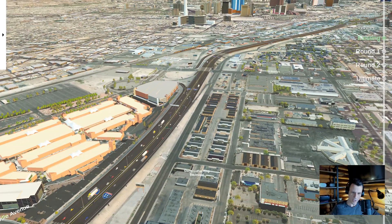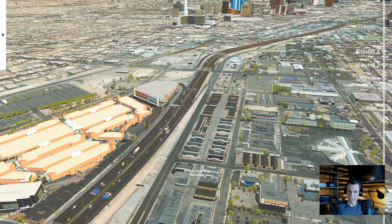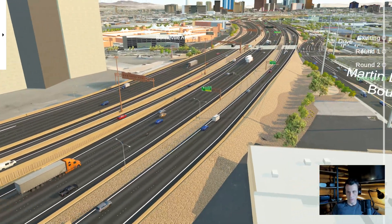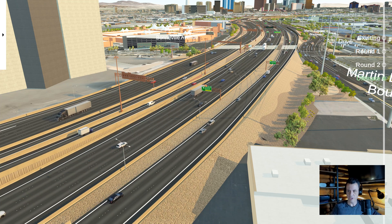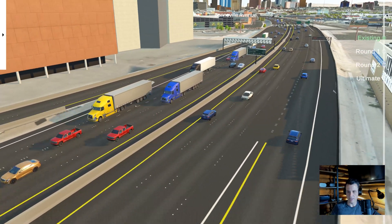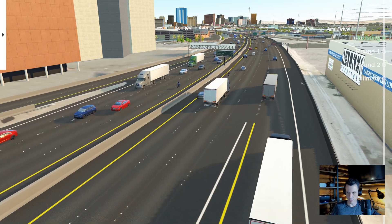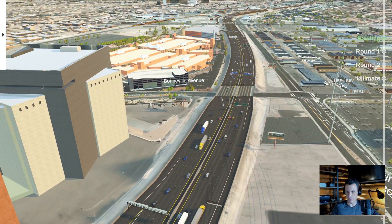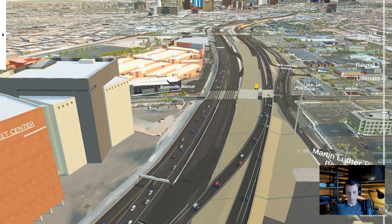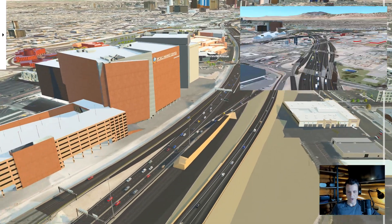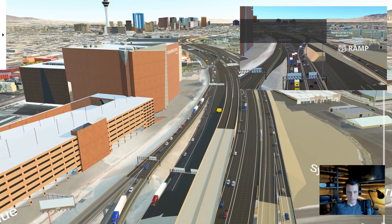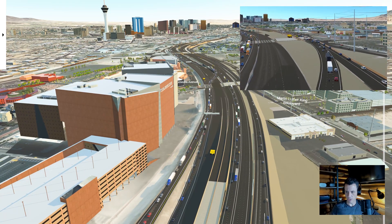Then we started getting proposed files and integrating them in. We built a phasing script that allows switching between existing and proposed. Since this was our first interactive project, we also had to build a simple traffic system — just free-flowing traffic that would randomly generate along splines. There's also sound; the closer you get to vehicles, the louder it gets. We eventually built out construction phasing because they had to move traffic over to different sides during construction phases. A lot of these ended up on our local news, especially the videos we generated from the model.